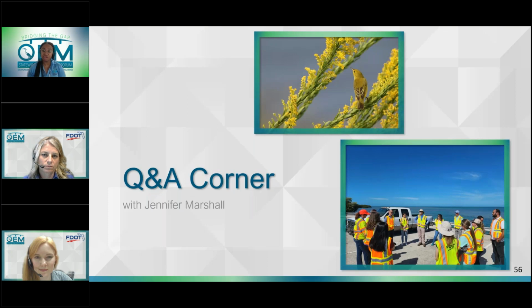First of all, there is an RFQ. The contract is selected by qualifications, and NEPA does not necessarily have to be completed, meaning the original NEPA document, prior to the advertisement of the project. So we have some projects that are going either way. We have some that are fully complete with NEPA. We have some that the NEPA is not complete yet. So it allows more flexibility.